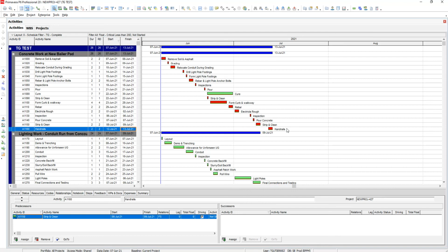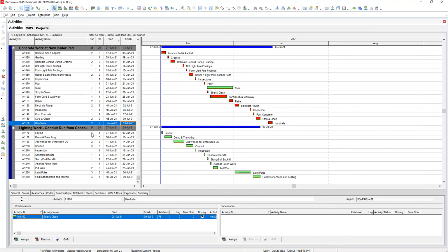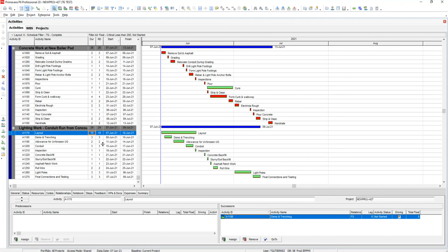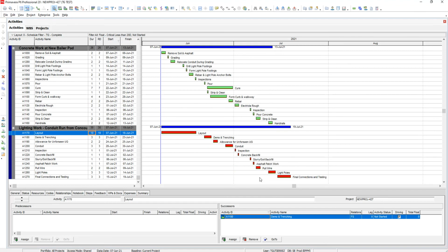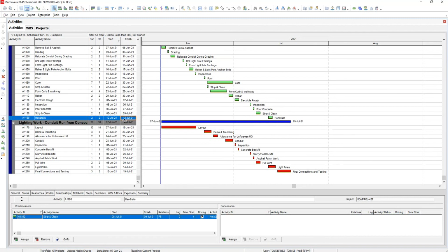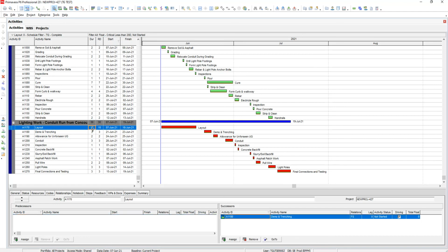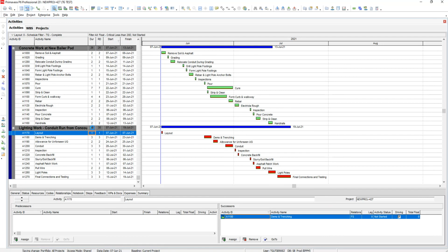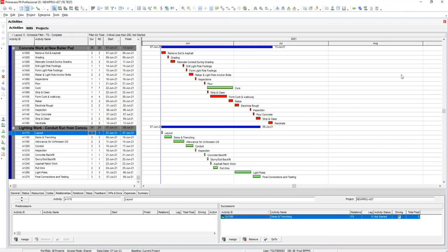It's critical, right? And here, I can show you, let's say I wanted to just cheat it and lay out, I'm gonna just plug in 10 days, right? And I F9. Look at the red bars at the top. They're going to go away, and now this bottom section is going to turn red. You see that? Because now this is longer. This is July 19th versus this is still July 13th here, right? So it's a lot smarter than running Excel, and it just gives you a lot more information. So I'll take that back. All right, so that's it. Essentially we rebuilt that Excel schedule.